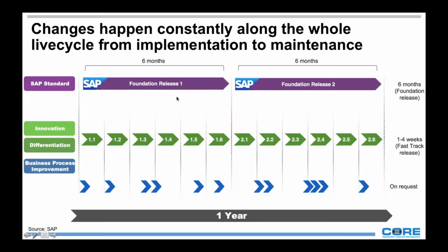So every 6 months you would deploy a major release, something major happening in your SAP or non-SAP environment, right? And then you have your minor innovations, minor changes that can happen weekly, bi-weekly, every month, every quarter. Those are minor releases. And you have your regular change that can happen every day, on demand, because you have something really important to fix in production, or something regular, the way your corporation does change today. You deploy things every day, right?